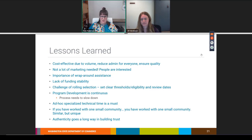The time between their initial meeting with me and the handoff to the consultants ended up being vital time for the community to become familiar with the system and to really define what resilience meant to them. The majority of communities did not have this defined before the technical work began, and we found that oftentimes large design changes were needed once the community became more familiar with the technological capabilities and its limitations.